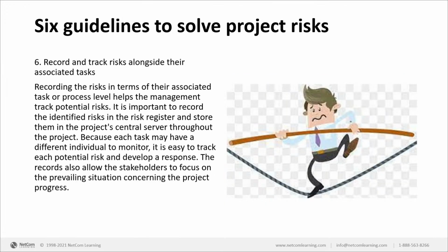And the last thing, record and track the risk alongside their associated tasks. Risk management, keep this in mind, is not a one-time activity. That's not at all a one-time activity. Throughout your project, the priority of the risks will keep on changing. There will be new risks identified, old risks moving out of the picture. So you need to keep the document up to date.